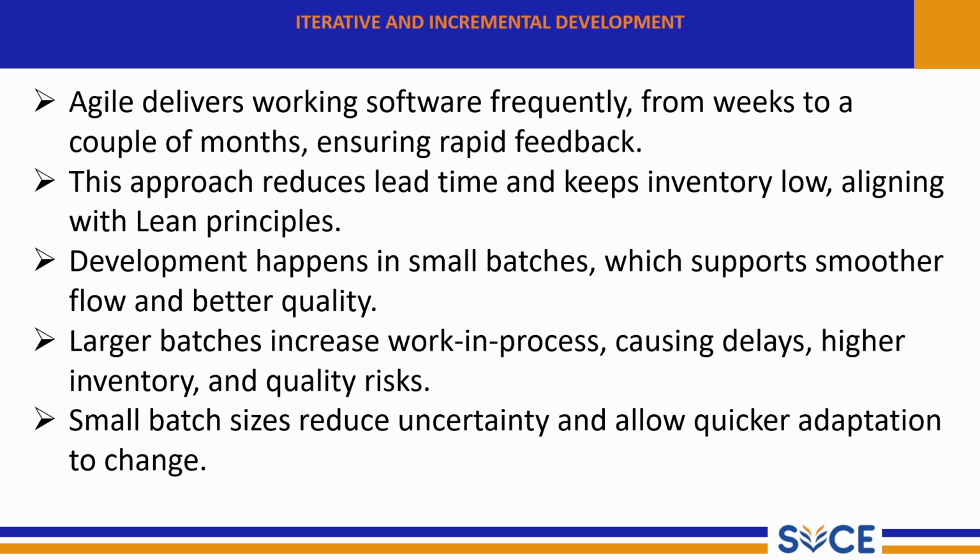Lead time is the total time taken from starting a task to delivering it. Since Agile works in short cycles and delivers the features quickly, the lead time is reduced. Also, work-in-progress inventory stays low, which means there is less unfinished work lying around. This matches lean principles of speed and efficiency. Development happens in small batches, which supports smoother flow and better quality.